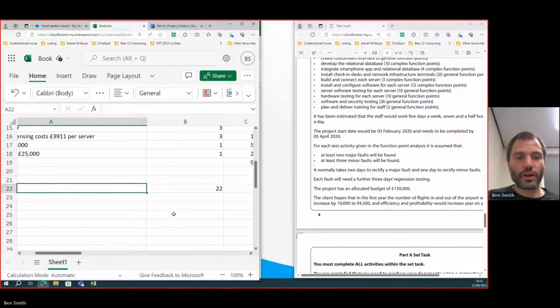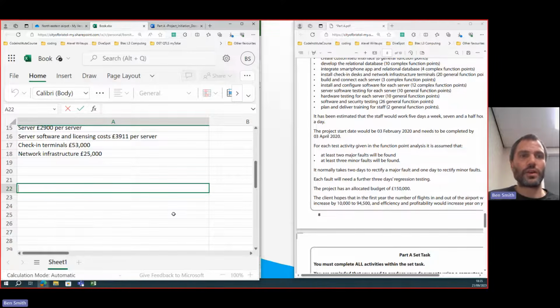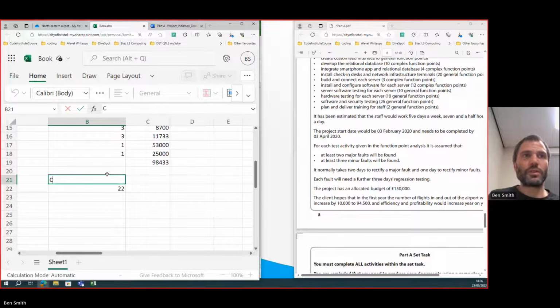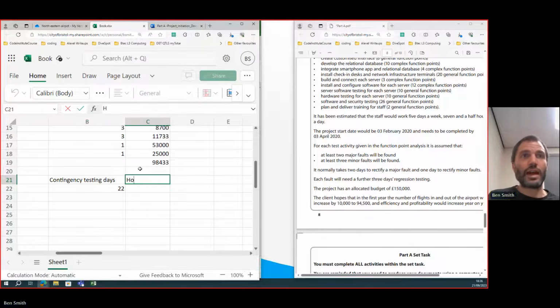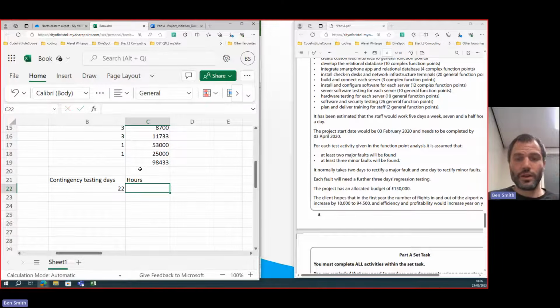So let's call this contingency testing time, in days, and in hours, because we're going to need to update our hours above in a second. So remember we said each day is 7.5 hours, so 22 times 7.5. So for each of those 3 tasks, we're going to need to add on 165.